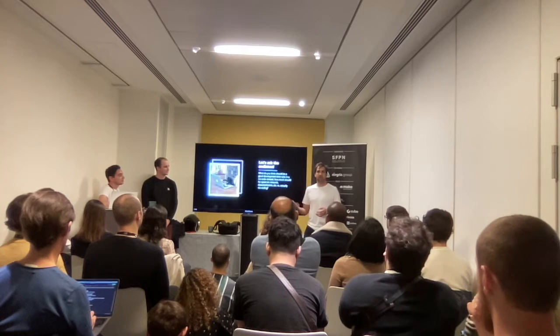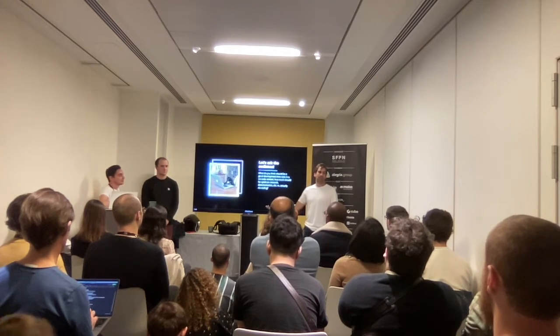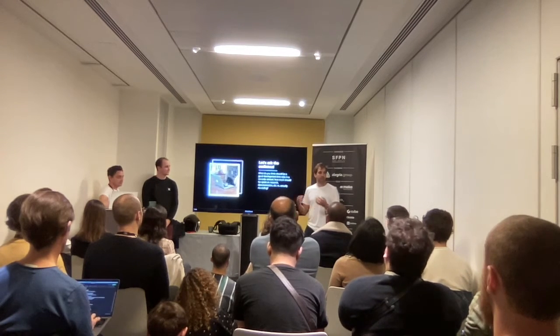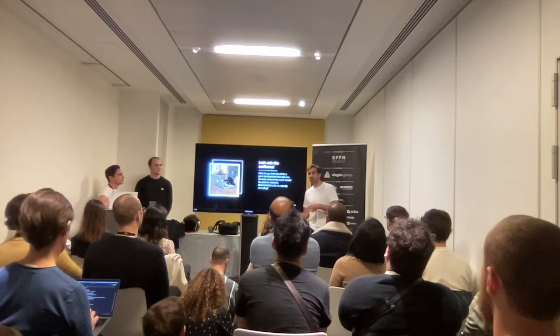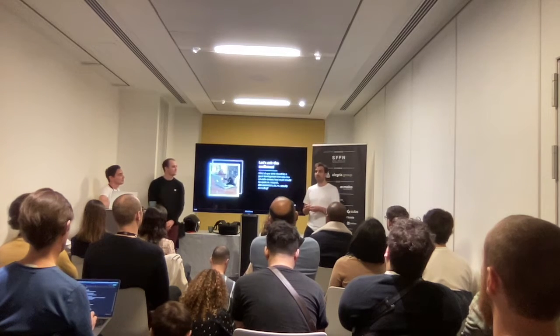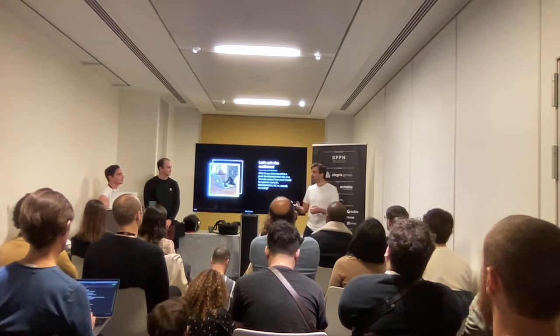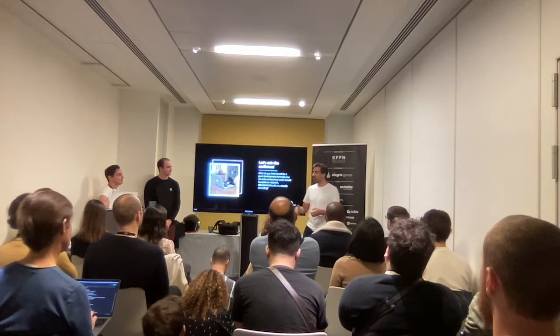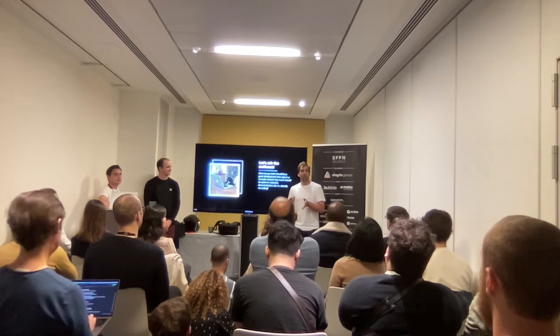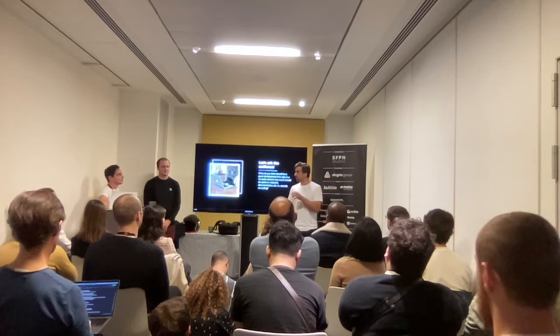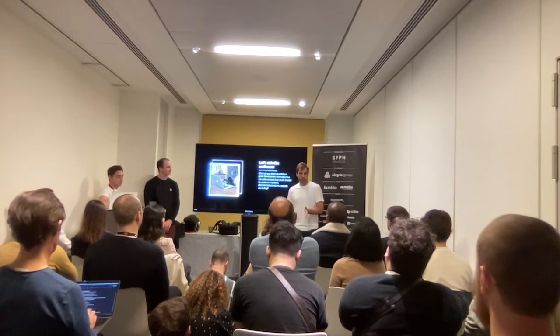Then you have a phase of value engineering, where a maker and a product manager work together, analyzing all of what we call the hard points: the technical challenge, product challenge, and other types of challenge as well, such as performance. It's around a week for small improvements, the size of a feature as well.